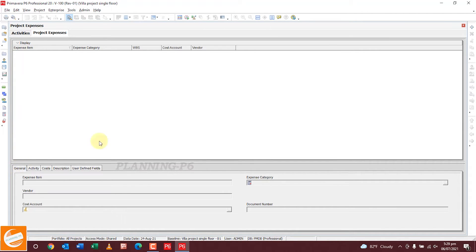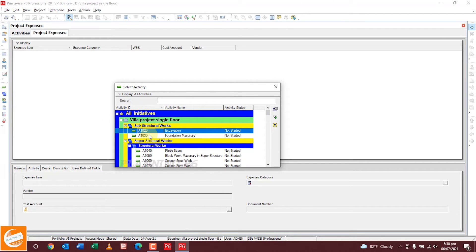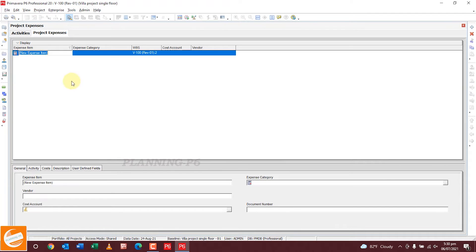First of all you will add an expense and select the activity to which you want to add expenses. We want to add an expense to the excavator activity. Select this activity and expand it. Add the expenses item — for example, rent per excavator.